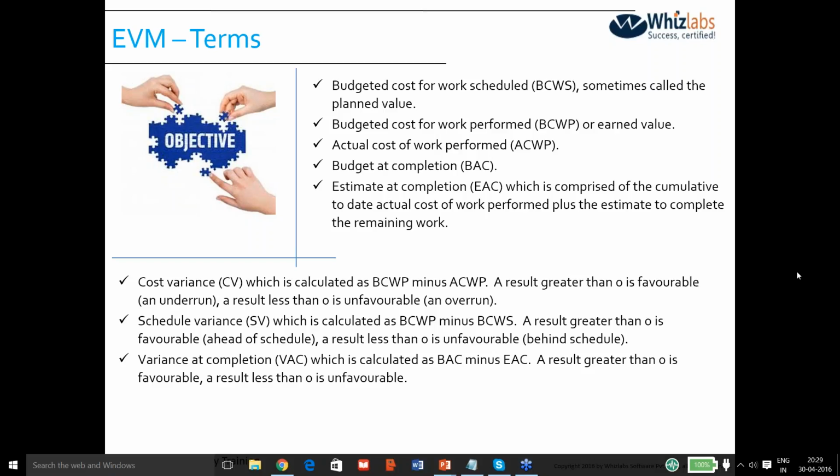If he is spending more money, he is basically at a loss. The less money he spends, the more profit he makes. So you have the earned value, you have the planned value. It is quite possible that you are able to do things well as planned. Probably you are ahead of schedule. I mean, the plan was 10, you are able to do 20, but at what cost? You are basically spending more money. So actual cost is also a very, very important parameter.